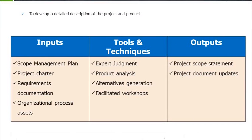Then we saw define scope. In define scope, the inputs are the scope management plan, project charter, requirements document, and OPS. The tools and techniques are expert judgment, product analysis, alternative generation, and facilitated workshops. The outputs are the project scope statement and project document updates.